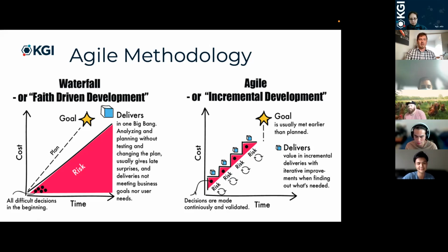So your risk is significantly reduced, even if the total cost and time of the entire project is the same. In this scenario, maybe it's 1 year, $100,000, but each iteration is broken down into maybe 3 months and $25,000, and we can kill or adjust the project at the end of each iteration.